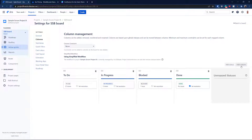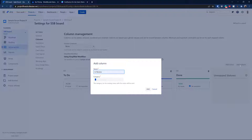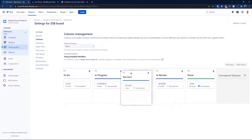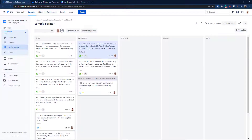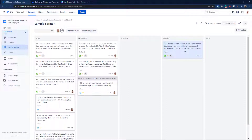Let's add a few more columns — we'll add 'In Review.' Here's something clever: if the status 'In Review' does not exist in Jira, when you add the column, Jira automatically creates that status for you. You can then reorder the columns by dragging them. Don't forget to hit F5 after adding. This is the whole beauty of simplified workflow — you can build a sophisticated workflow right from the board without going into project settings.